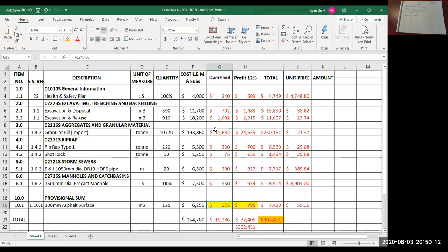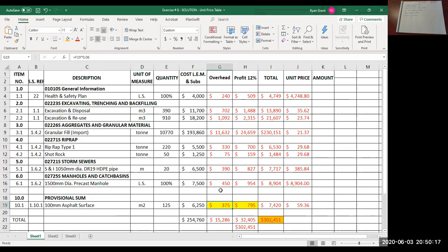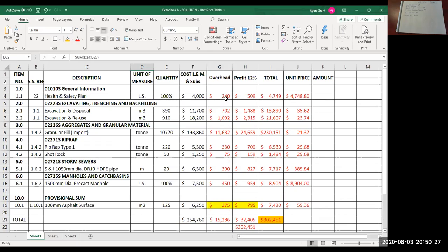So what I do in my day job is I don't spread overheads. When I say spread, that's what you're doing, this calculation. So you're taking this total overhead and you're spreading it over all your bid items based on the size of each individual bid item, right? This big one here, that's more than half the cost of your estimate, receives more than half of your overhead costs.